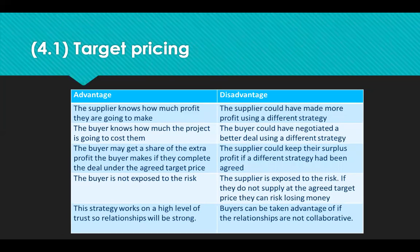Now we're going to look at target pricing, thinking back to the building company example and comparing it to cost plus. With target pricing, the supplier knows how much profit they're going to make, and the buyer knows how much it's going to cost them. But the buyer may get a share of extra profit if the supplier completes the deal under the agreed target price, so the buyer is not exposed to any risk. This strategy works on a high level of trust, so relationships need to be very strong. The downside is the supplier could have made more money or negotiated a better deal using a different strategy, and could keep their surplus profit if a different strategy had been agreed. The supplier is exposed to the risk — if they don't achieve the agreed target price, they risk losing money. And buyers can take advantage of this relationship if it's not truly collaborative.